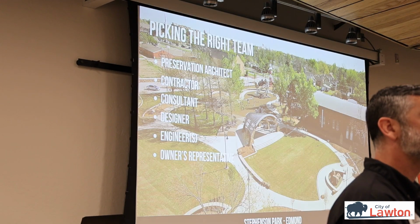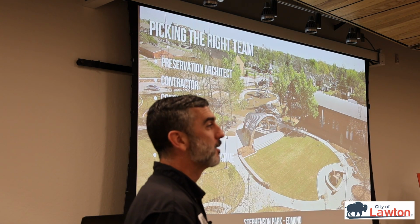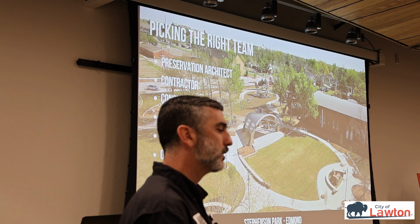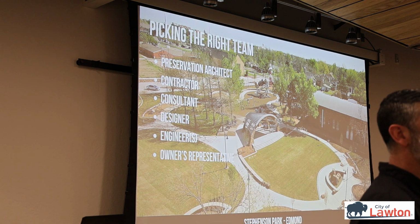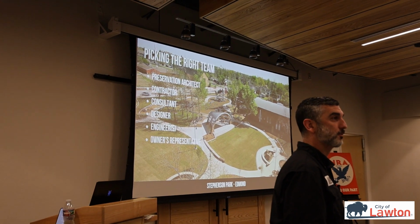And anytime you have an architect and engineers involved, we really want to bring contractors in early so we can start collaborating, because architects and designers may be separated from our costs a little bit, and so we may have this great idea, and plans get put together and construction documents are out there, and next thing you know, we're 2 or 3 times the budget for the project.